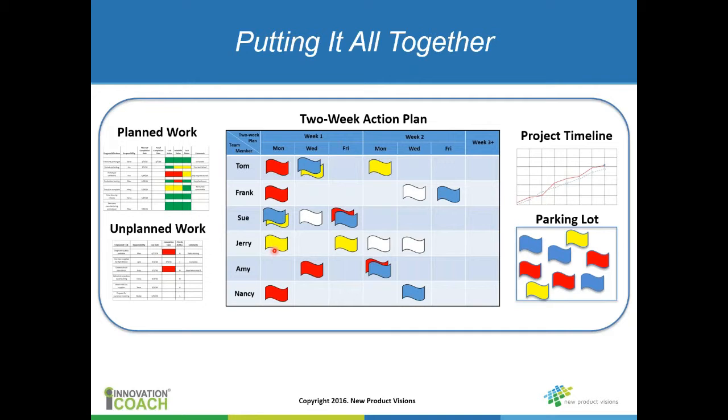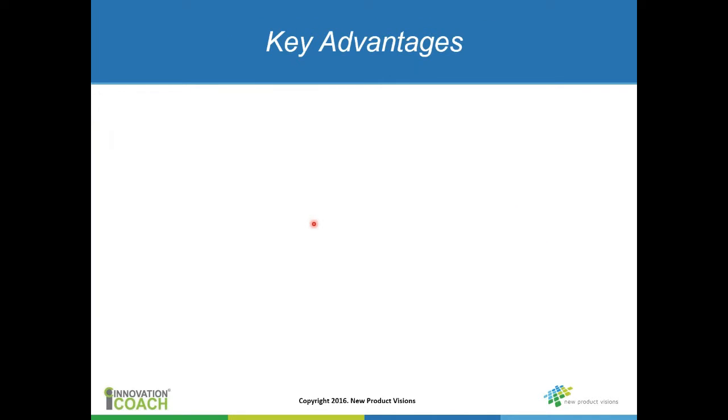The final thing is that it's important not to modify these tasks until the next meeting, because everyone is leaving that meeting with a perception of what's happening, and you don't want to change it between meetings. You only make the changes at the stand-up meeting. Okay, so that's the essence of the Lean project management tool.